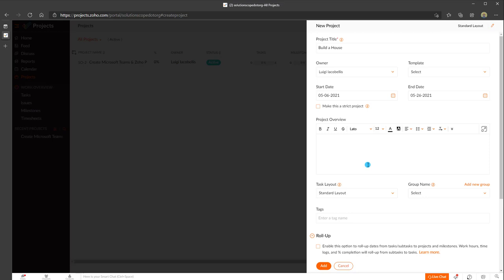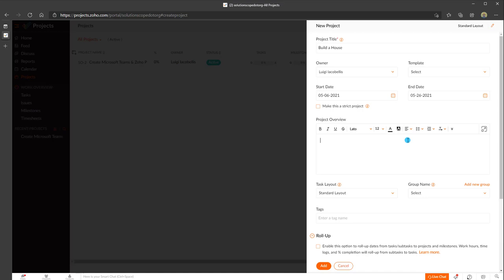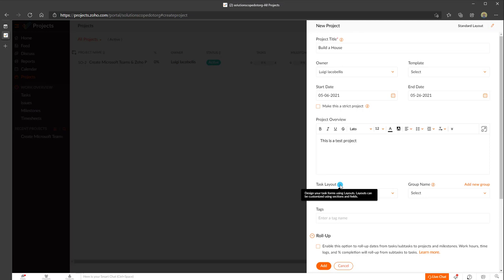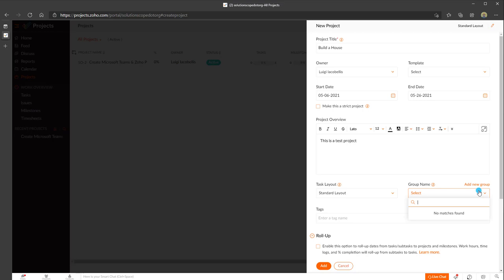You also have the ability to make this a strict project. If you check this, you won't be able to create tasks, issues, or milestones that extend beyond the boundaries of the start and end date. You can enter a project overview and specify layouts for how tasks are displayed — essentially customizing what fields are shown on forms. If you have multiple groups or teams, you can provision projects and assign access using specific group names.